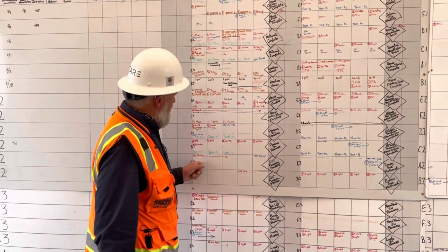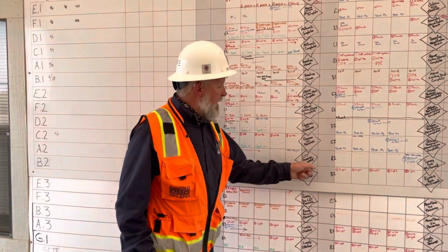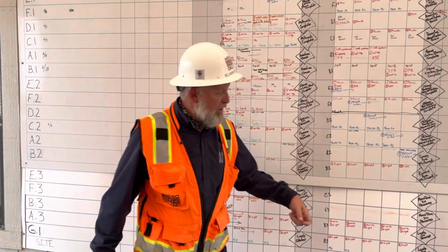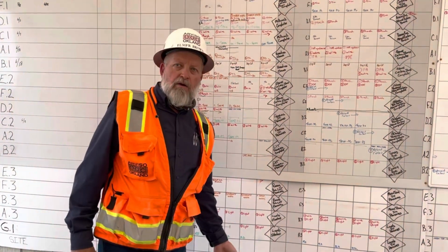So maybe a guy who's going to be here for a full 2 weeks hanging rock, we would say, okay, 50% the first week, 50% the second week, because come Friday, we're going to talk about how we did on our goals.